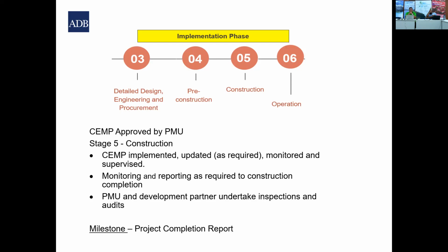Then you would invite the private developer, if it is a construction proposal, to submit a CEMP. And until you receive the CEMP and you've undergone a full assessment, then you will grant the full license. But in many cases, I see they just go ahead and grant the license.